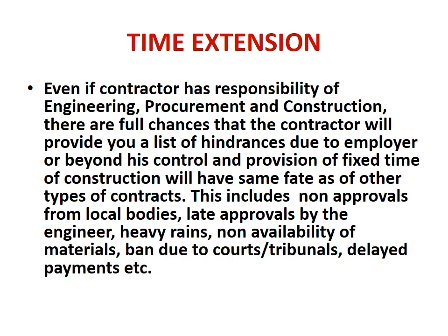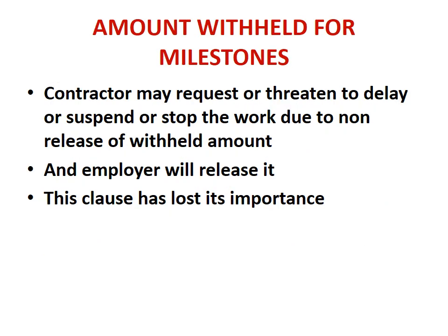This includes non-approvals from local bodies, later approvals by the engineer, heavy rains, non-availability of materials, bans due to courts or tribunals, delayed payments, etc. So actually, even if a fixed time contract is there, it becomes like a normal contract, and time extension is sought by the EPC contractor.